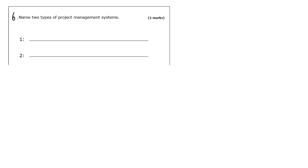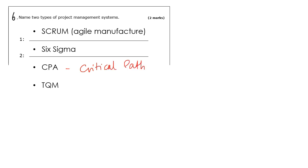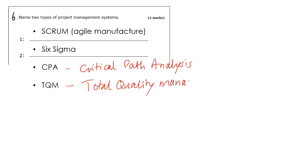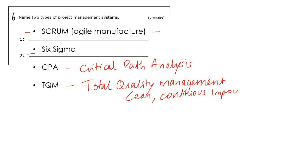Question 5: name two types of project management systems. There are four in the book: critical path analysis (already covered), TQM (total quality management), Scrum, and Six Sigma. Scrum is all about working in a team to meet goals in short time-scale sprints, being agile and making changes quickly. Goals are specified and feedback is daily, allowing quick response to issues. Six Sigma is probably the weirdest one, so we'll go through that in more detail.